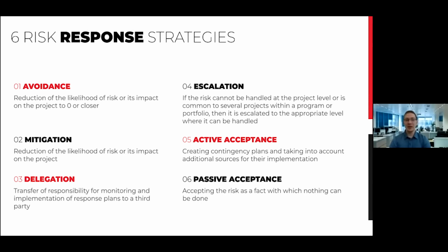If the customer agrees with the fixed price contract, he delegates most of the risks that have been identified in the risk register to the service company by paying some fee that has already been included in the price. In the case of the time and material model, the price will be cheaper, but the additional effort for handling risk impact, in case they occur, will be billed to the customer.